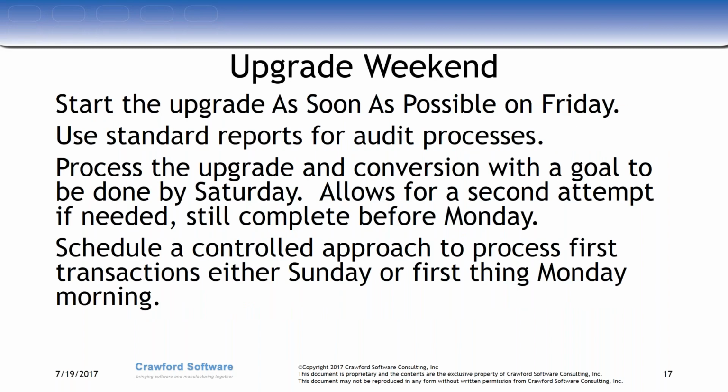Some recommendations for the upgrade weekend itself. Start the upgrade as soon as possible on Friday. Ideally, most people end at 5 o'clock. If there's a way that we can start at 12, anything we can do to start earlier will help you. And the reason I mention this is we have always done our projects that we start on Friday. We will work Friday night, Saturday morning, whatever it takes. We want to be done with the upgrade on Saturday. We want to be at that point where we're ready to look at audit reports and validation on Saturday.